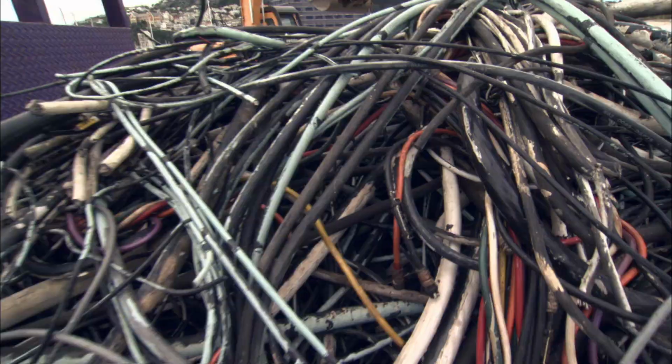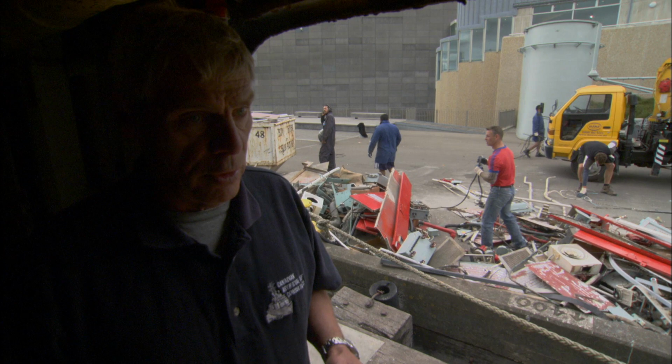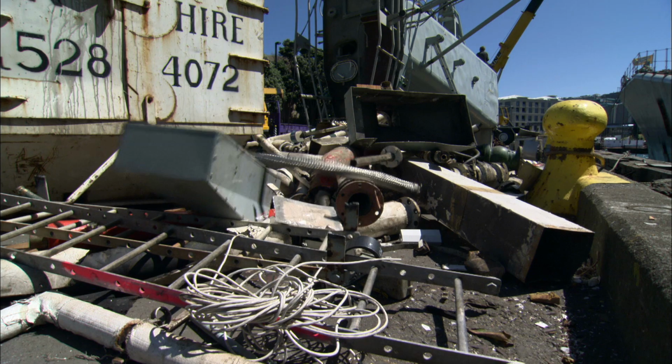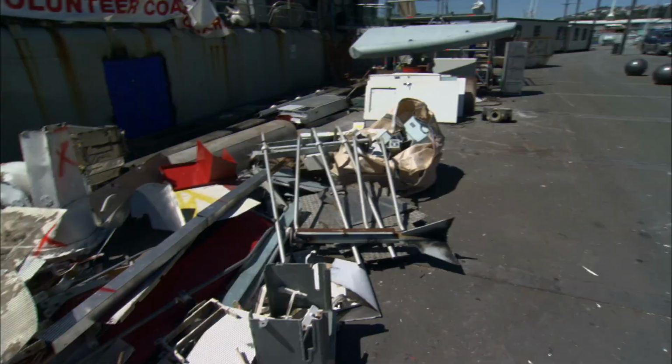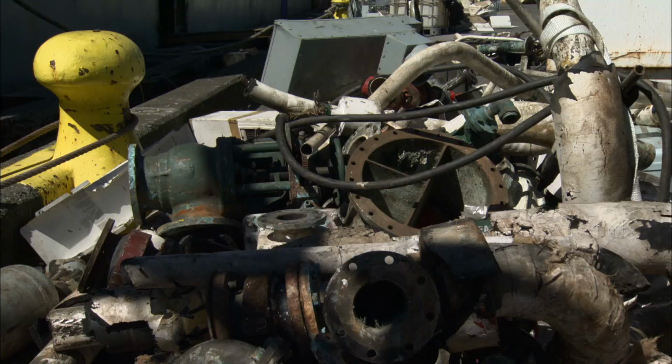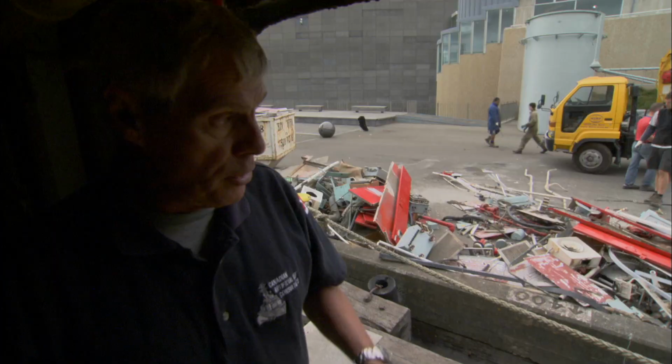One of the ways they fund these artificial reef projects, such as the Wellington here, is through pure scrap value. They'll scrap the ship and use that money to prep the rest of the ship. A ship like this will be in excess of $250,000 of scrap value. And what you see is the boys out here processing that scrap now as it's coming off the ship.